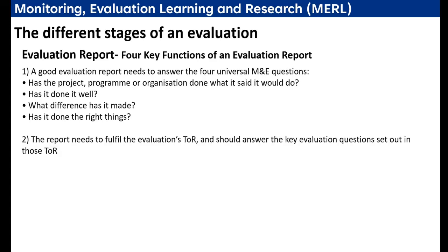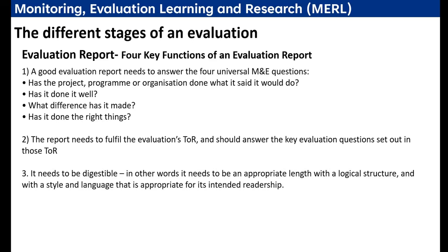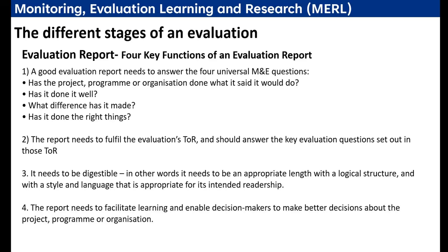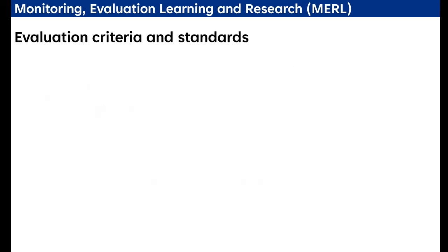The report needs to fulfill the evaluation's TOR and should answer the key questions set out in those TORs, because in the TORs you usually come up with these questions. It needs to be digestible. In other words, it needs to be an appropriate length with a logical structure and with a style and language that is appropriate for its intended readership. The report needs to facilitate learning and enable decision makers to make better decisions about the project. If you are reviewing an evaluation report, these are the major points which you should consider.